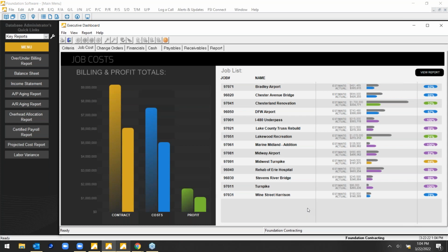All of the accounting transactions feed directly into these respective reports. So this is all live data. Now, the gist behind it is, if we look on the left here, we're going to see totals for all of our active jobs. So in this example, I'm running about 9 million in active jobs or contracts. And it shows that I've estimated or budgeted about 7.5 in terms of my cost estimate. By way of those numbers, here's my estimated gross profit.